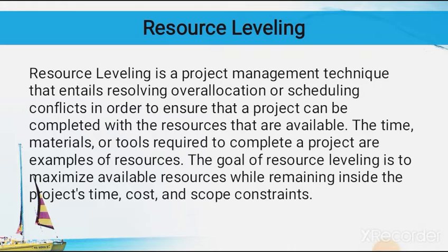Resource leveling is a project management technique that involves resolving overallocation or scheduling conflicts to ensure a project can be completed with available resources. Depending on your team's needs and possible outcomes, if the goal is to keep the current project deadline, more resources may need to be made available. If the goal is to run the project with currently available resources, the deadline of the project may be extended.